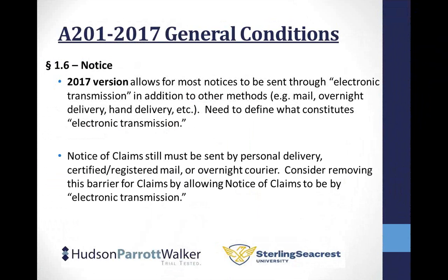You know, in practice, is this a good idea? It might not be for your company. You might want to have the ability to send a claim via email with all the attachments. A lot of times personal delivery, certified mail ends up just being a barrier to entry for the claim, and it's a gotcha provision. So one of the things you might want to consider when you're negotiating the contract is whether you want to allow a notice of claim to be sent electronically by email. It might be something you want to do. Any questions on that? How many of y'all send claim notices by email? Show of hands. One.